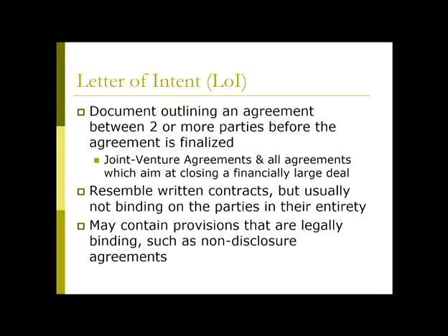So it's sort of a mini contract within the letter of intent. So when you get to the end of the process of working out whether or not you can work together, if it turns out that you can't work together for whatever reason, then nobody is bound, except maybe by that confidentiality bit. Okay, so a letter of intent is often a really important stage on the way to developing a big contract.